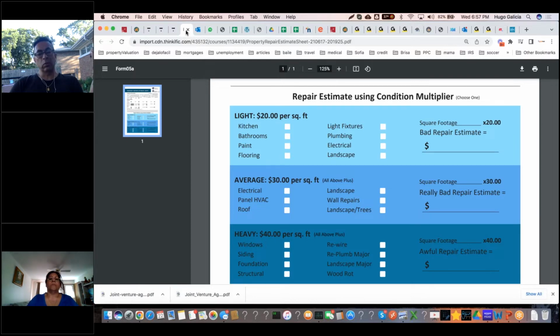You don't want them to pay for materials. Also, because what we've noticed is that they end up using leftover materials from other projects. So you get the leftover quality from other projects. So it's not the best. It's not a good idea. You want brand new materials, and the way to guarantee that is for you to buy the materials. We buy the materials primarily from Home Depot.